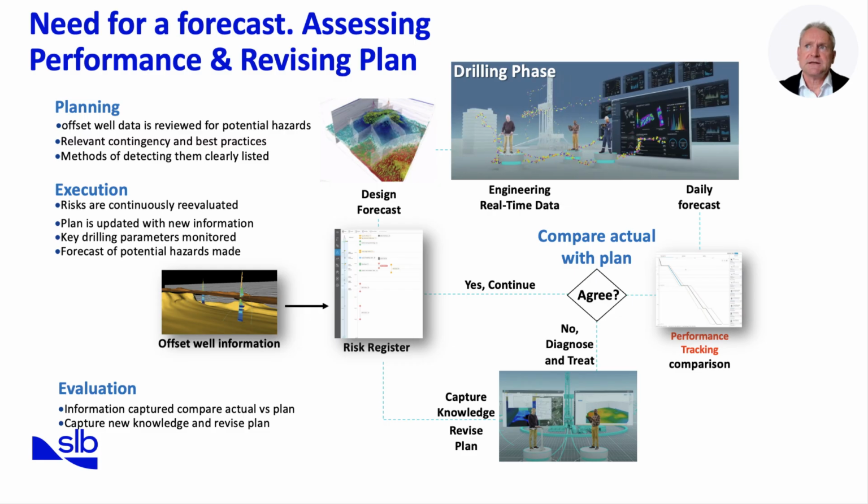Forecasting also plays a central role in assessing performance and revising plans as conditions evolve. At the planning stage, forecasts are built using offset well data. This allows us to anticipate potential hazards, identify best practices, and clearly define methods for detecting early warning signs. As drilling begins, the forecast is translated from a risk register and daily updates. Real-time engineering data feeds into this process, ensuring risks are continuously re-evaluated.